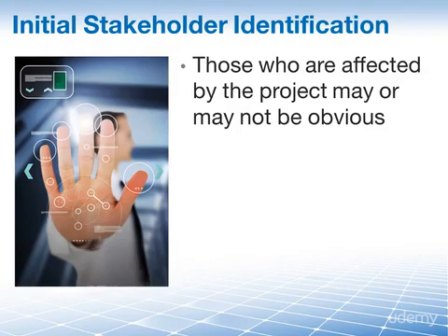However, there are certain times when stakeholders exist who may not be readily apparent. For example, on a project where a large bridge needs to be repaired, obvious stakeholders would be the commuters who use the bridge, but not so obvious maybe the local transit authority, who will have to devise a system of bridge tolls to pay after the construction.